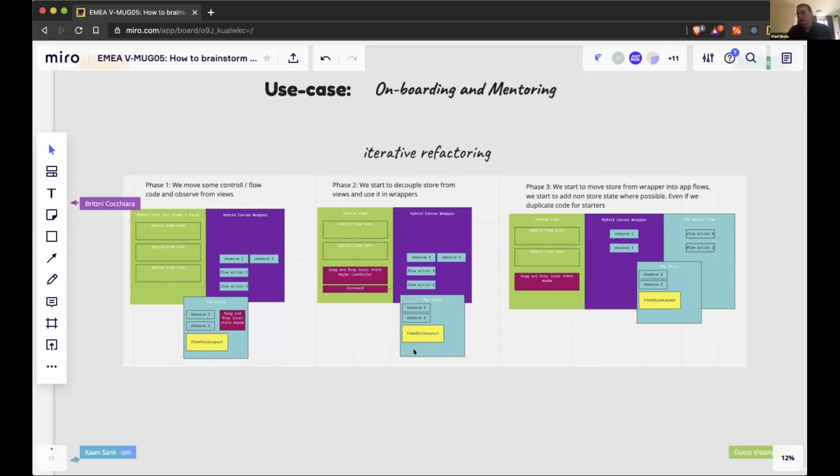It would have been quite risky to let them work for maybe 1 or 2 months without having a working version. So we came up with a visual plan, which had 6 phases, but I couldn't show you the last 3, where we would split the proof of concept, the experiment that they built, into smaller deliverables. After each phase, they would have a working version that could be code reviewed, and more changes could be requested at the end of each phase.